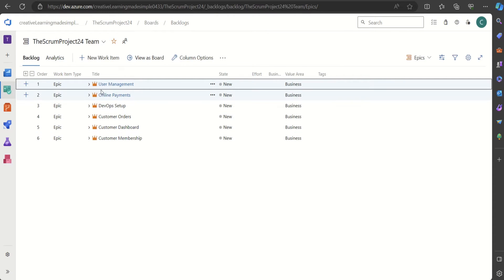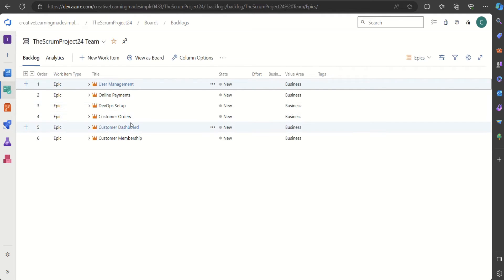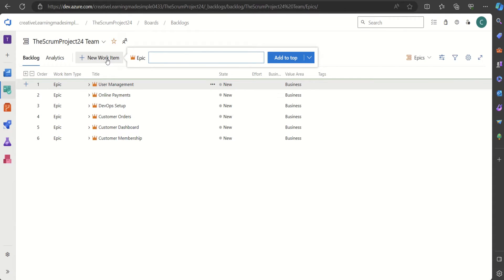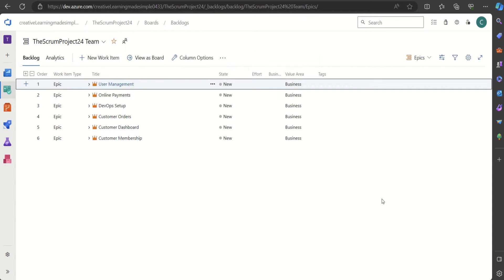These are the epics I have created in Scrum Project 24: User Management, Online Payments, DevOps Setup, Customer Orders, Customer Dashboard, and Customer Membership. For members who are new, you can always go to 'New Work Item' and define an epic as well.